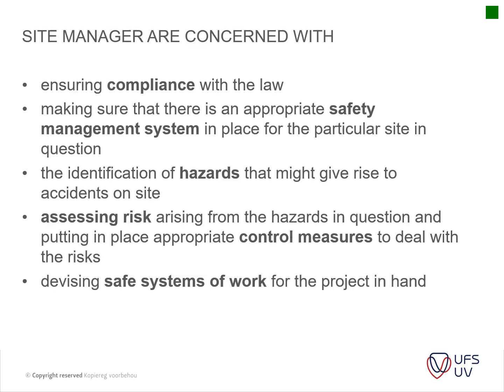The site manager is usually concerned with ensuring compliance with the law, like for instance getting a certificate from the Department of Labor before construction is done, whether the health and safety file is in place, whether the safety rep has been appointed, and whether all the medicals have been done on site.